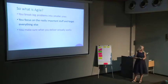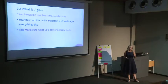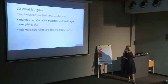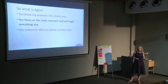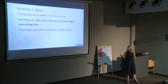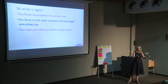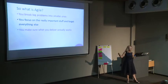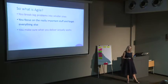You make sure what you deliver actually works. Quality is absolutely key in any project. In Agile, everybody is responsible for quality — if your analyst doesn't get the right requirements, whatever the developers code isn't going to be quality. We do pair coding where developers sit together, decide on a solution, and code it together. We also do code reviews so that by the time we show what we've done in two weeks to business owners, we've tested it at every single step of the process.